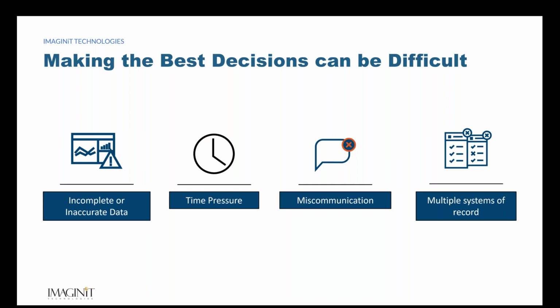Incomplete or inaccurate data leads to these problems. From a facility side, I've heard that up to 14% of rework on a job site could be caused by bad data coming in. Designers, general contractors, and subs are all working on different platforms, and that causes a problem because we're all working in our own little headspace and we're not sharing as effectively as we would want to.